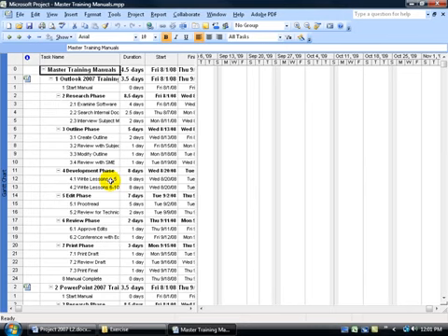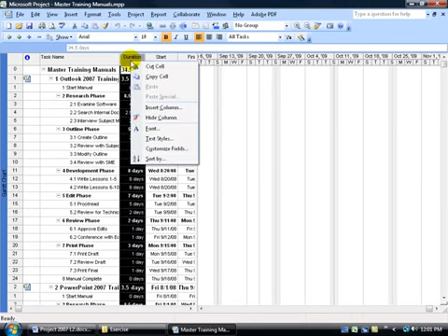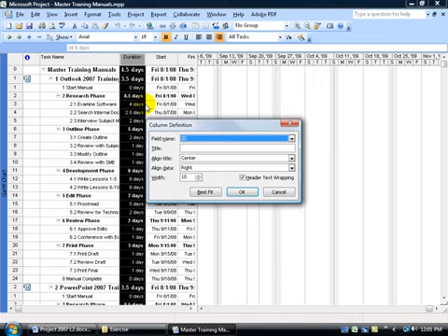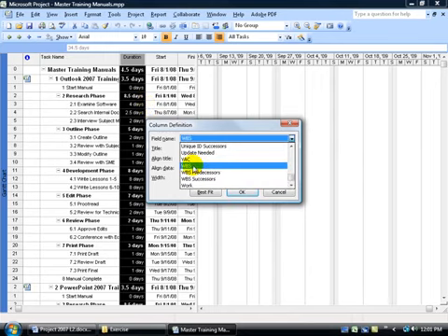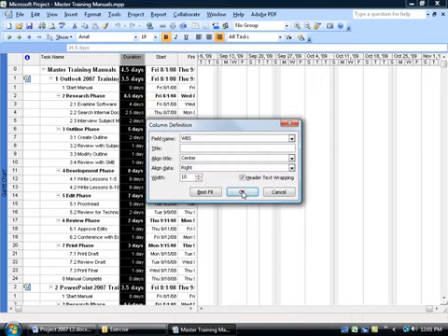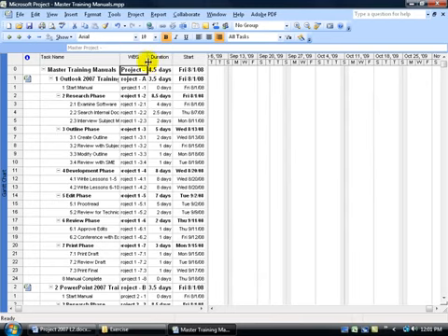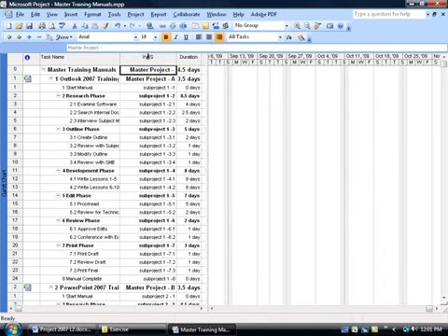Now when I want to display them all, you have to come up here and insert it as an individual field or column here by right-clicking on the column header of any column that you see there. Go down to Insert, type the W to get us to the W's. There's WBS. Go ahead and select it, click OK, and there we go. Let me go ahead and double-click between the two column headers to do a best fit for the WBS column field, and let's scroll down.